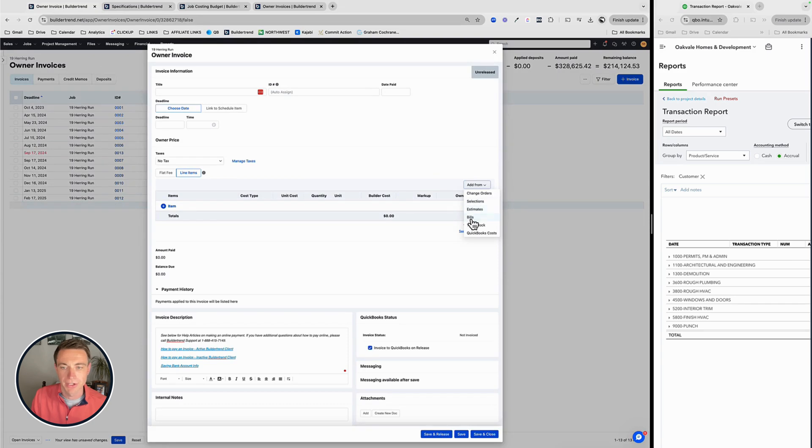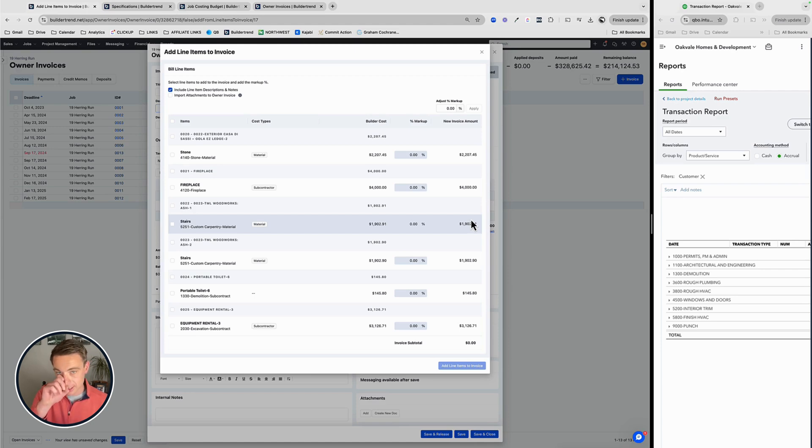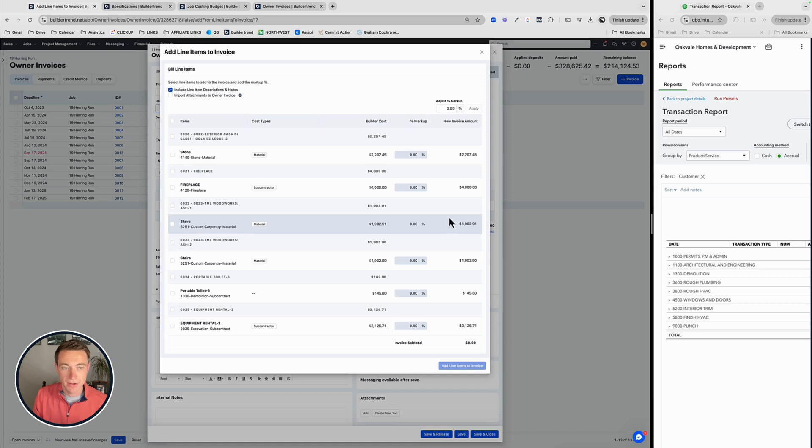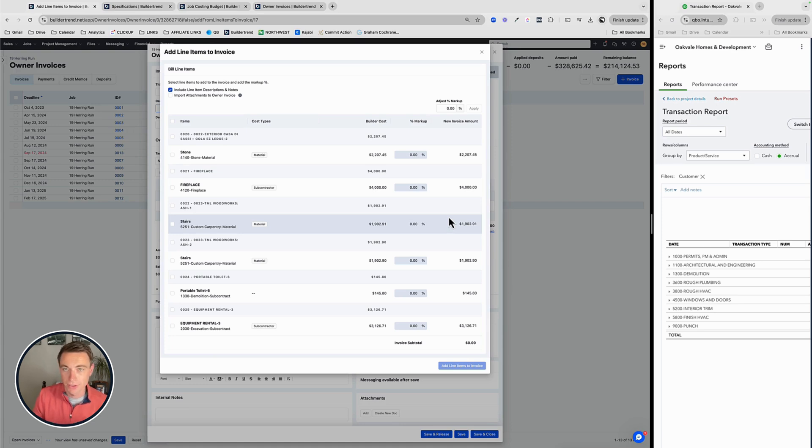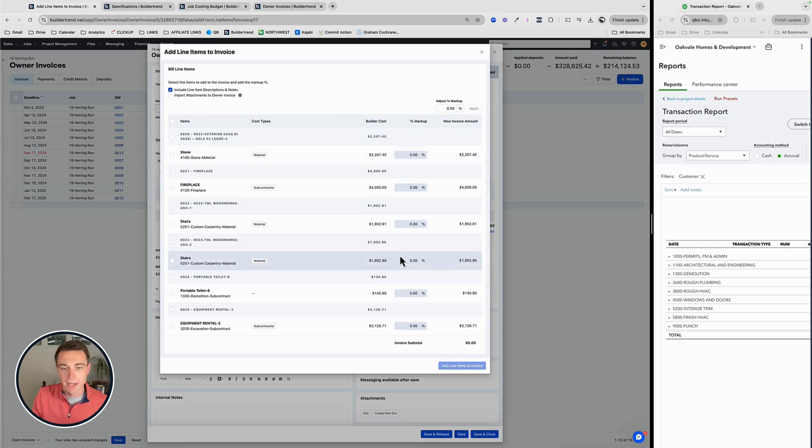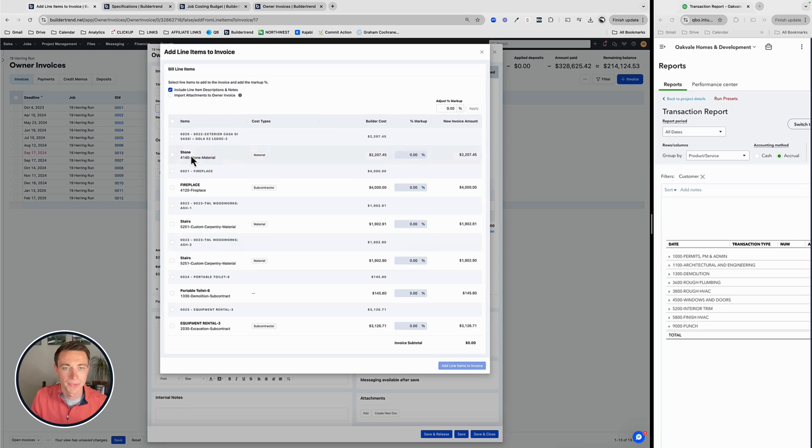Let's start with just general bills and QuickBooks costs. Really simple. So if I go to my owner invoice here, if I go to bills, this is going to bring up all the bills that haven't yet been added to other invoices that appear within BuilderTrend. Now, this is really important to understand. These are bills within BuilderTrend. These aren't QuickBooks costs. So these are things that we've added to BuilderTrend. And again, I'm going to say, typically we want to maximize our use of the BuilderTrend bills as much as we can. We can't do it for everything because we go to the store, we go to Lowe's, Home Depot, we're swiping our card. Those are QuickBooks expenses. I'm going to show you those next. We can't do it for everything. I don't think you should anyways, but we can do it for a lot of bigger ticket items, usually thousands of dollars or so. We would rarely have a bill here for like $12 and 58 cents. Those small transactions are typically going to be tracked in QuickBooks and brought over.